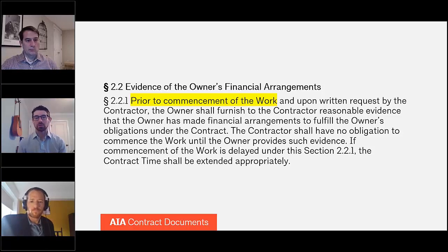And if, for example, a judge looks at that and says, well, let's use that 50-story high-rise example, you're talking a 50-story high-rise multifamily mixed-use project and the owner turned over a one-page balance sheet, for example? Well, a judge in all likelihood is going to look back at that and say, probably was unreasonable. That's not enough really to satisfy.